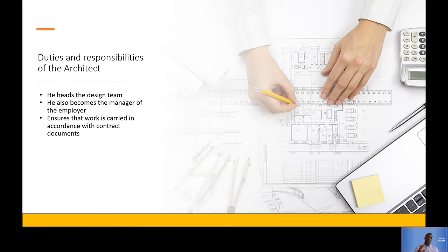So pre-contract, there would have been documents that were signed and approved. These documents could include the drawings, the design, and the municipal policies. There are lots of documents involved, but it is the architect's duty that the actual construction is done in accordance to those documents.